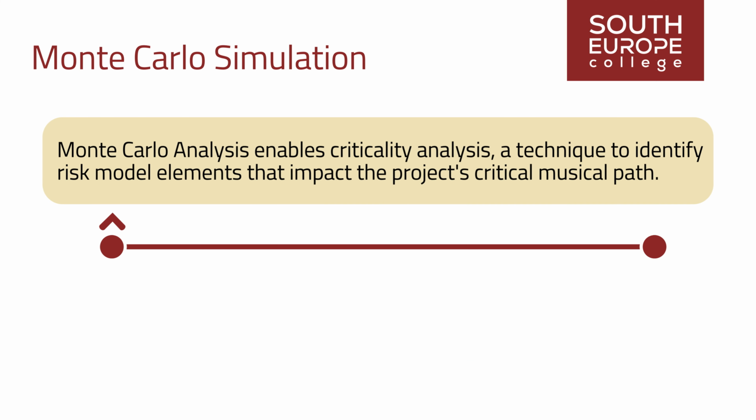Moreover, Monte Carlo analysis enables criticality analysis, a technique to identify risk model elements that impact the project's critical path. Project teams can prioritize risk response planning efforts by calculating a criticality index of each component, representing its frequency on the critical path during simulations. Elements with higher criticality indices receive greater attention, allowing project managers to focus on mitigating risks that pose the most significant threats to overall schedule performance.